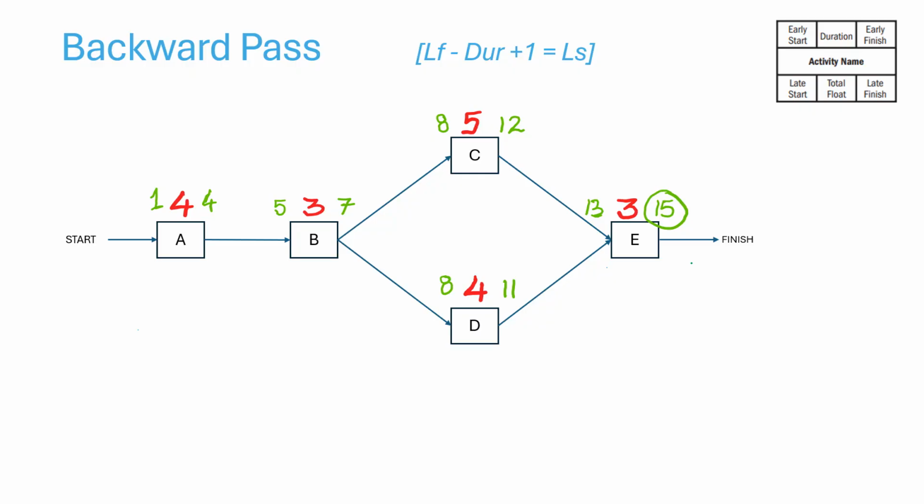So we are going from Friday back to Monday, Friday, Thursday. So the days that we calculate now will go in reverse. Okay, I will show how this is done. Remember that for the forward pass, we started with the day 1 because that's when we will start the project. But when we go in a backward pass, we will start from the end day, that is 15.